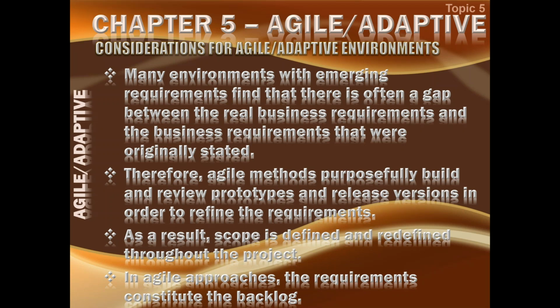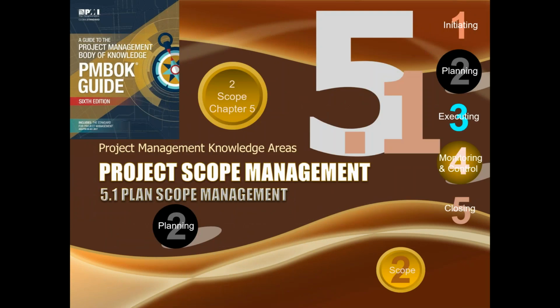In agile approaches, the requirements constitute the backlog. So all the requirements you have collected so far will go into the product backlog, and then out of the product backlog, you will keep picking the job and keep doing that. So that is as far as the general topics are concerned. So I've covered them all.